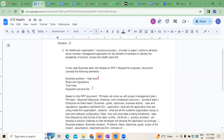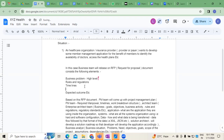For that, the very first thing is about the RFP — Request for Proposal. Whoever wants us to develop the project will usually release an RFP document, which majorly focuses on the business problem at a high level, rules and regulations, timelines, expected outcome, and technical expectations. All these things will be mentioned under the RFP document.